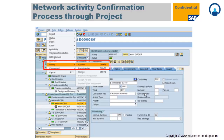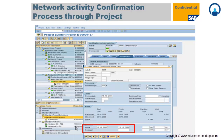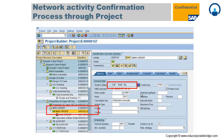For internal activities, you need to confirm that particular activity so that cost is captured. You go to the activity, select the activity that needs to be confirmed, and click 'Confirm Activity'. You provide the actual dates and the percentage of completion, and whether it is a final confirmation. Partial confirmation is also possible in the system. After clicking Enter, your activity is confirmed and cost moves to actual cost.